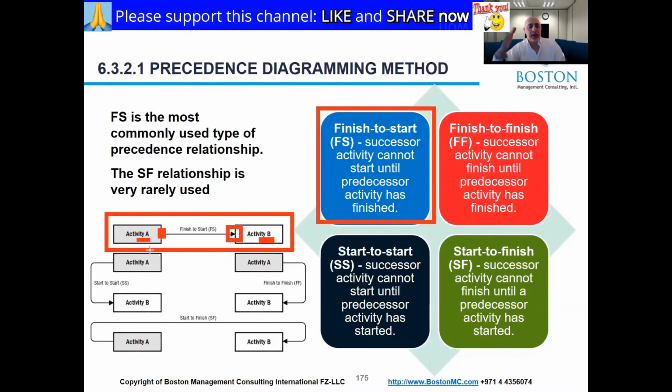We want to paint it once and then twice. Let's make it simple, 5 days, round numbers. It takes 5 days to paint it the first time, the whole office and corners and everything and ceiling. And then we want to paint it one more time, so it will take another 5 days. So if we use the finish to start, then we will need 10 days.